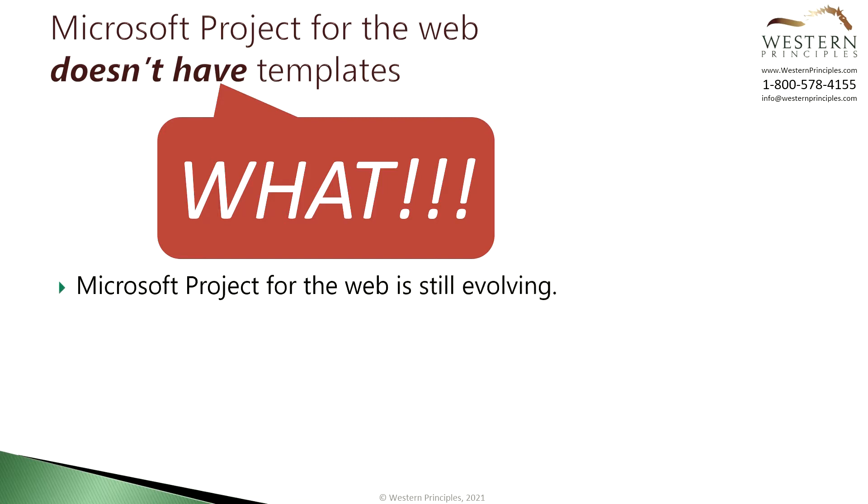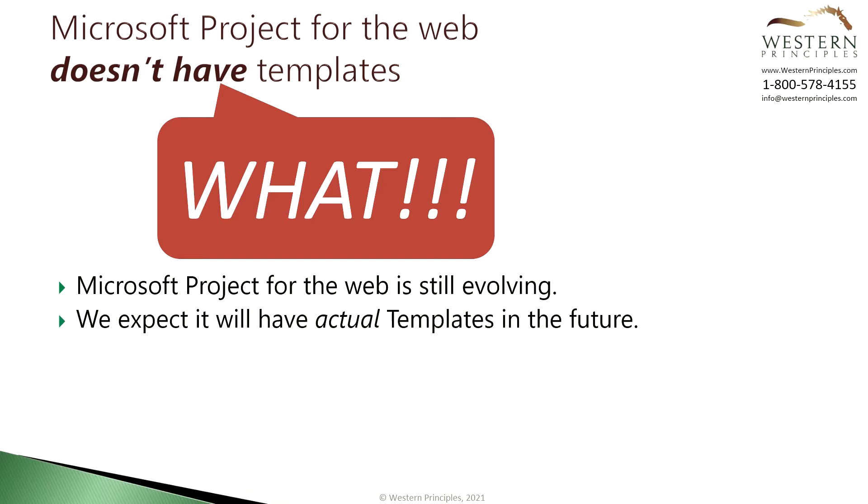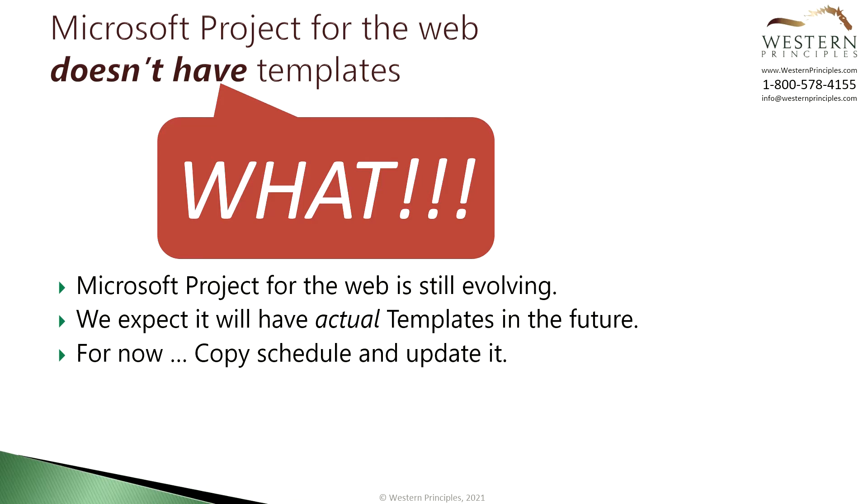Project for the Web is developing in an iterative manner with new functionality released all the time. At some point we expect they will have actual templates. For now we simply copy the schedule from the project home and then we can update it from there.